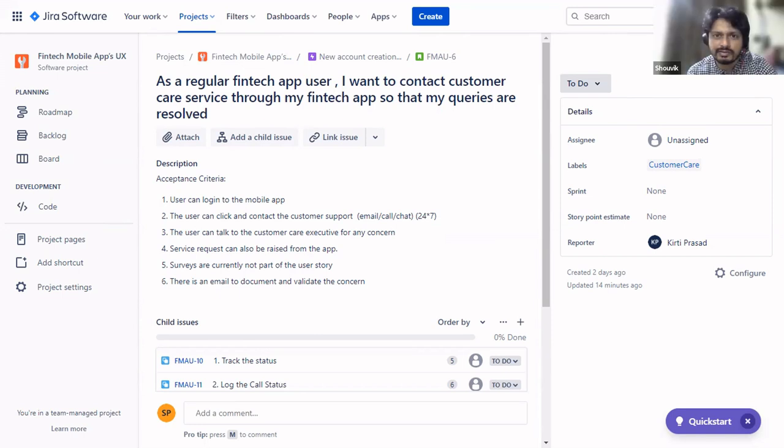Okay, before we go to the estimation for this story, just a quick reminder. For the tasks, whatever estimation you have given is effort estimation, right? And you remember that story estimation factors in multiple things. It's not just the effort estimation, but also the risks, dependencies and the complexity of the user story. So just keep that in mind, because you just gave the effort estimation. I don't want you to be confused and think just about the efforts. Okay, with that said, let's do a story estimation for this one. On the count of 3 again, show me your fist of 5. 1, 2, 3.